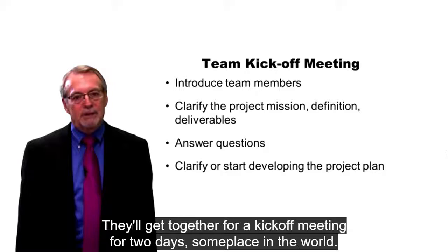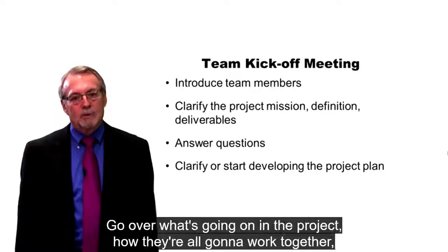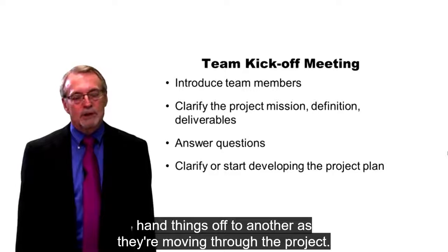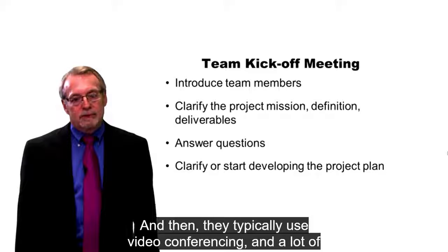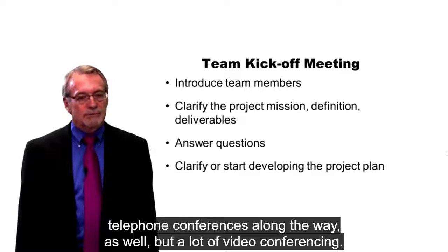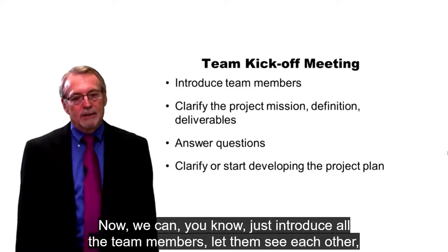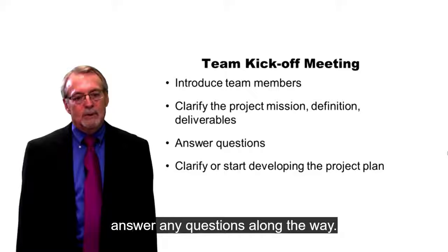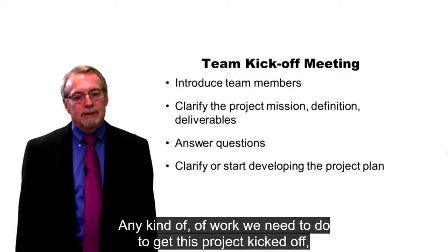They'll get together for a kickoff meeting for 2 days, someplace in the world, go over what's going on in the project, how they're all going to work together, how they're going to communicate, how they're going to trade things off, hand things off to one another as they're moving through the project. And then they typically use video conferencing and a lot of telephone conferences along the way, but a lot of video conferencing. But they'll have a face-to-face kickoff meeting. And we can introduce all the team members, let them see each other, get to know each other, clarify the project, answer any questions along the way, any kind of work we need to do to get this project kicked off. We can do that up front.